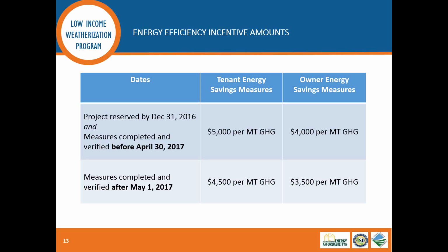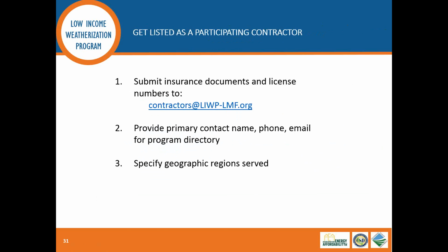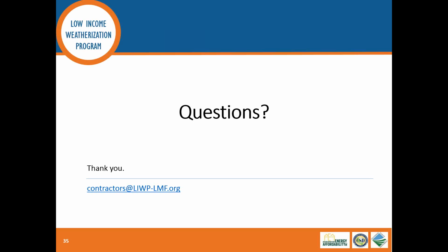Great. And maybe along those lines, so doing combustion safety testing, is that a requirement of the program? And maybe you can just talk a little bit more about the post-construction process of verifying. Sure, yeah. On the combustion safety side, AEA will be doing that at the energy audit stage on a sampling basis. And then based on that audit, if we identify any required combustion safety repairs, that'll be included in the scope of work.